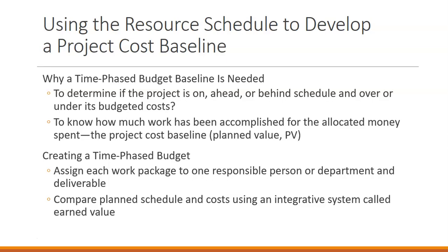That week is going to have a higher resource allocation than any other weeks. So if we are at week 3 and we've already spent $7,000 of that project, we might say, wait a second, we had budgeted $1,000 a week for this project. Why are we already at $7,000 in week 3? We're going to go way over budget.